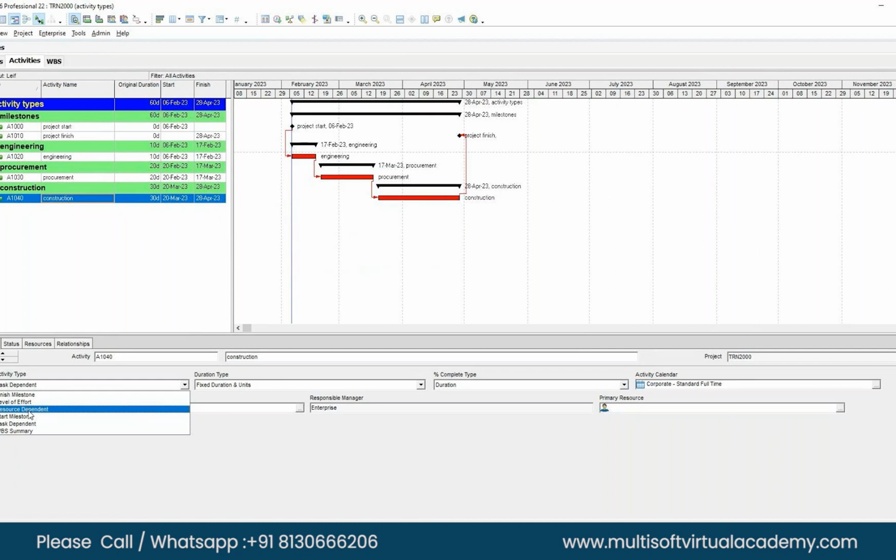Isn't it a bit tough to say before you have started your project that you are resource dependent? On the last job I helped with offshore, what became resource dependent was something we had never thought about. We didn't have people doing insulation and we didn't have people doing scaffolding. The two simplest disciplines in the world. And it nearly tipped the project. But again, if you have some specific resource which is shared, it's not available.